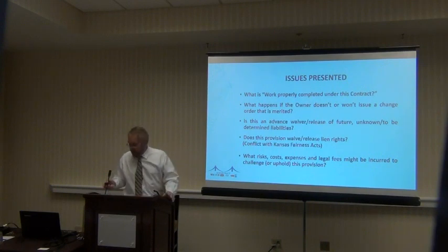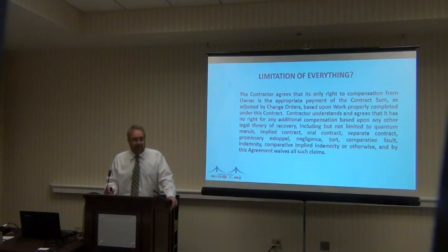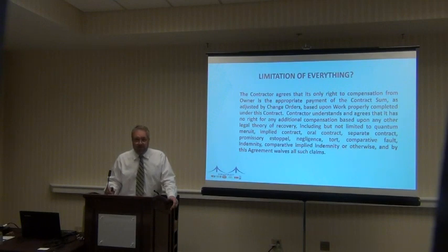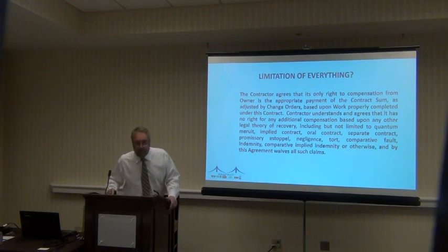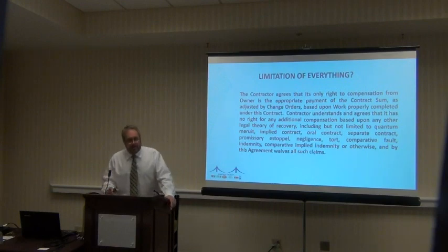And to me, the language, based on work properly completed under this contract. Well, on the day I signed this contract, I haven't completed a lick of work at that point in time. So I don't know where this is going. And so if it gets to be in the situation where there's more work done down the road that I should get a change order for, but the owner doesn't want to give me one, what is it? I can't sue him because I just haven't waived my rights. Well, legally I can tell you there's a real legal issue there. And that's why I think my fellow lawyer, when I asked him what he thinks of his clause, it was kind of like, well, we're going to try, but we don't know if it'll hold up.